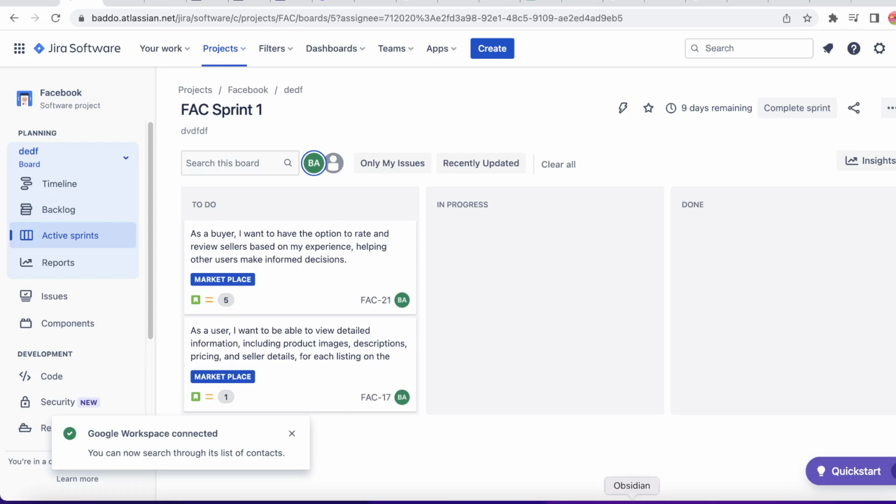There are times when the team members are working and management or stakeholders may start to approach some of them and drop some work on them. You would have to define all these things. You would have to define communication channels. And the moment you start a sprint, you can't just be dropping in issues or user stories. When you do that, it will be creating scope creep and spikes.